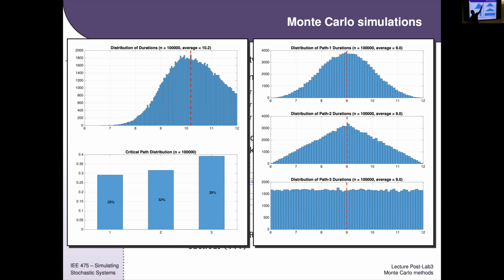So what you're seeing here is the central limit theorem unrolling in front of your eyes. The central limit theorem says that if I add up a bunch of independent random variables, then the sum of those independent random variables will tend to be distributed like a bell curve, like a normal distribution. And that's what you're seeing here. Add 1, add 2, add 3. If this keeps on going up, add to infinity, then this will look exactly like a normal distribution.